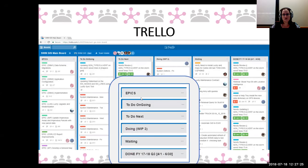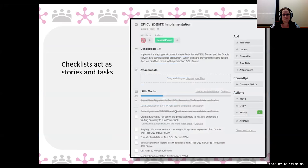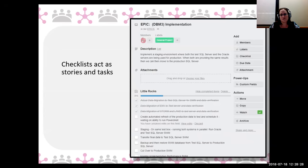Kanban is great for dealing with all the reactionary work and making sure we don't have too much on our plate. We use our daily stand-ups to ensure help tickets get done properly and use the Agile framework with epics. In Trello we have epics for ongoing work and a 'to-do next' column for reactive tasks. When we get an email about something not working, we put it in to-do next, everybody sees it, and that satisfies the Kanban aspect. Our epics function as checklists of stories and tasks that we break out into the to-do board.